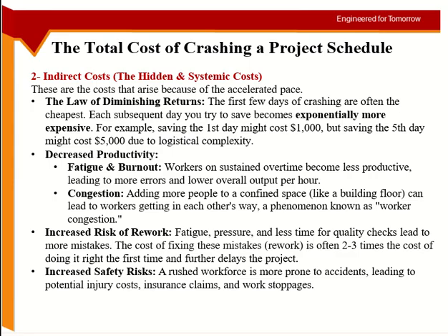Okay, so you may hire or you may pay for extra storage and so on. So these things, when you keep on crashing or compressing your schedule more and more, these things will keep on increasing. These problems will keep on increasing, and that will increase your indirect cost. Okay, and that will go towards diminishing returns.